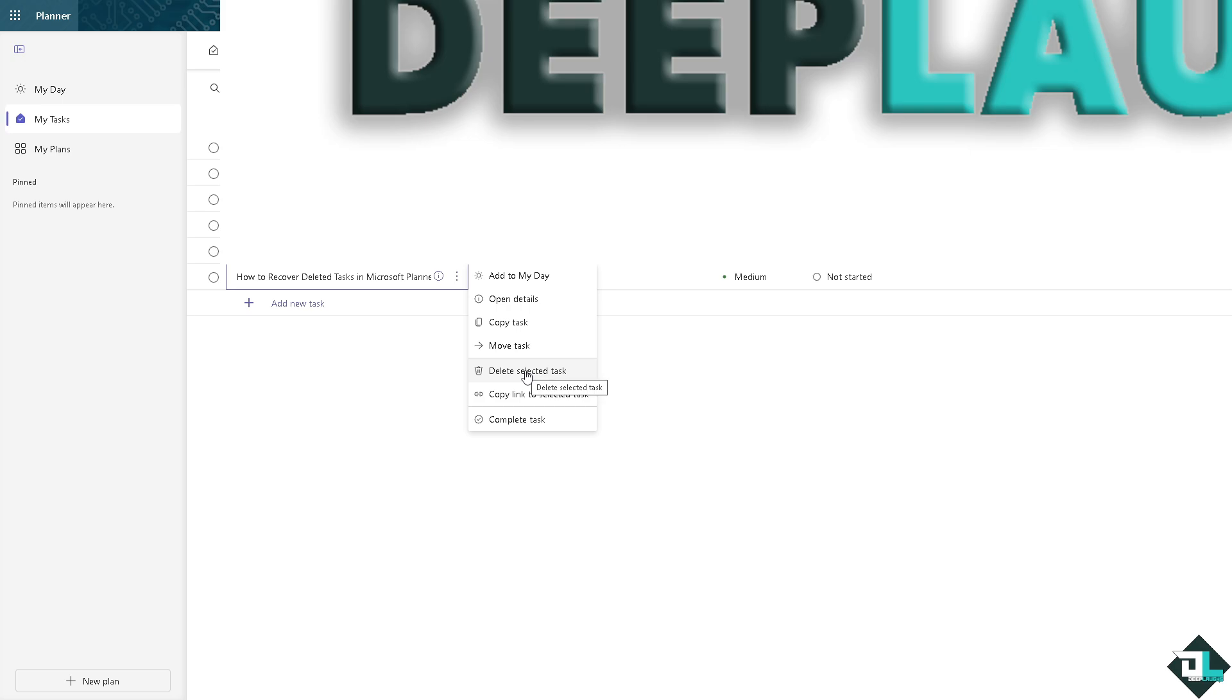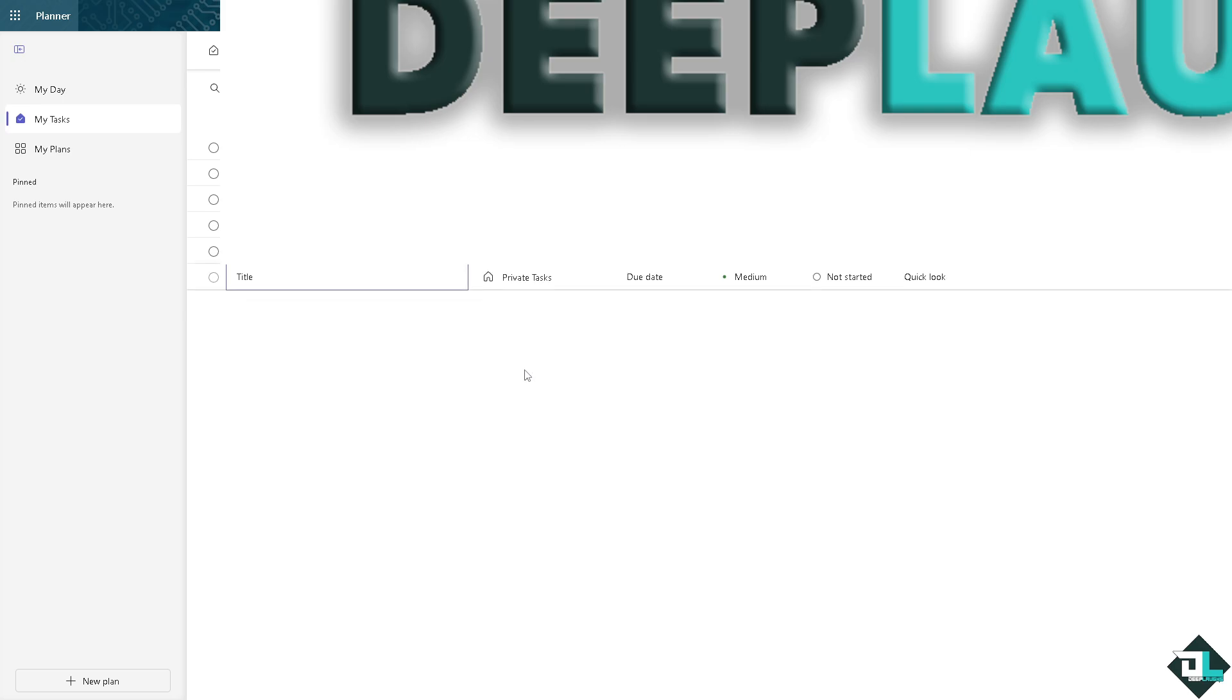You have to remember that here in Microsoft Planner, unfortunately as of this moment, Microsoft Planner does not have a built-in feature to recover deleted tasks. Once a task is permanently removed, it cannot be restored.